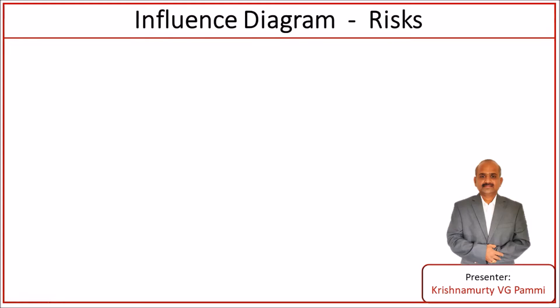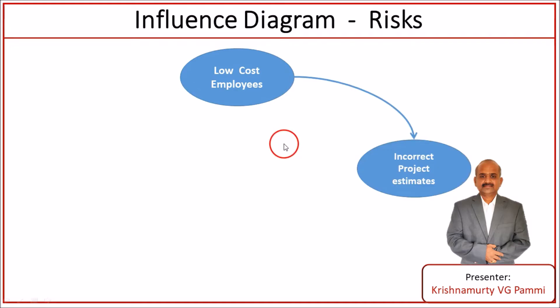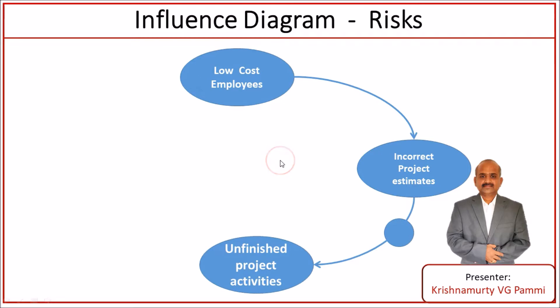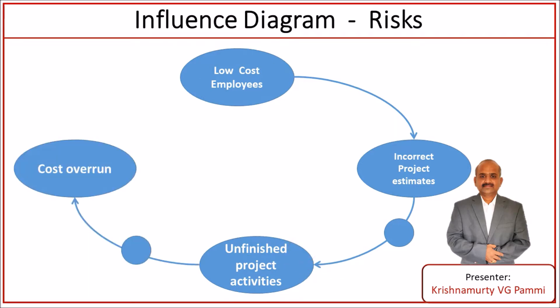Let us take another example of an influence diagram relating to risks. Whenever we want to start any engagement, we have a mix of skilled persons and low-skilled persons. Most of the time, management wants to maximize the percentage of less-skilled persons because they come at low cost. The moment you have more low-cost employees, they tend to provide incorrect project estimates because they are not rightly skilled, and you may end up with unfinished project activities.